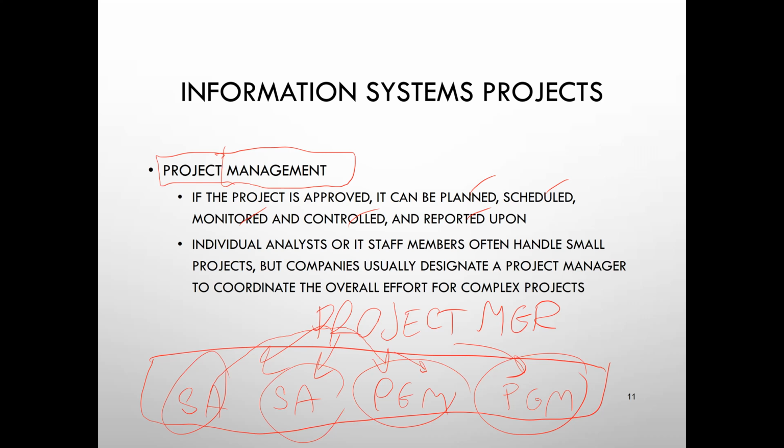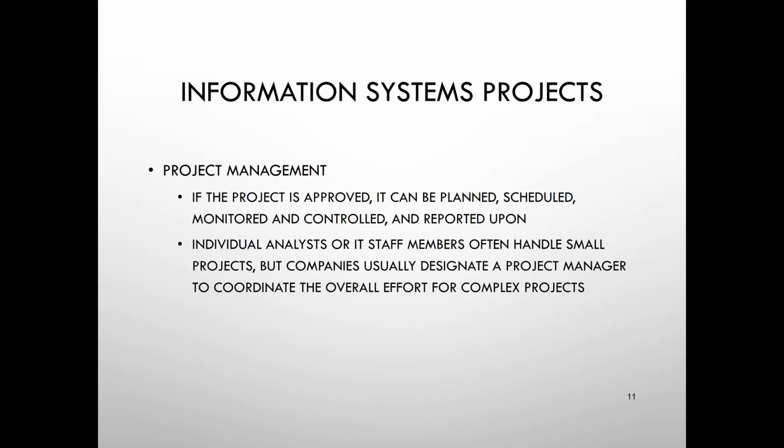But for the whole project, if it's delayed, what will happen? You may have to pay a fine, because normally in the contract there is a fine clause saying that if the project is not finished on time, the team, or the company the team works for, has to pay a fine.